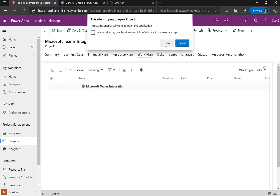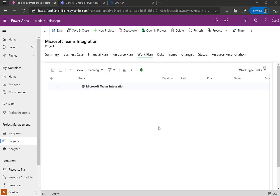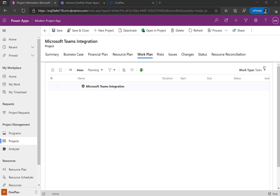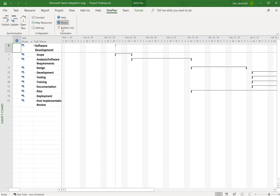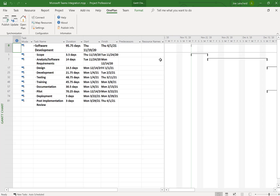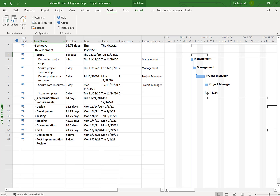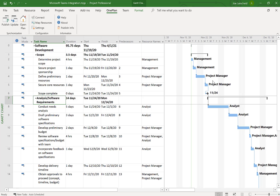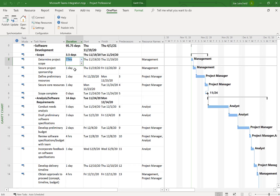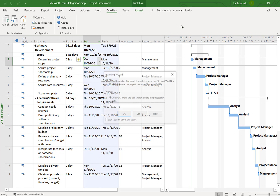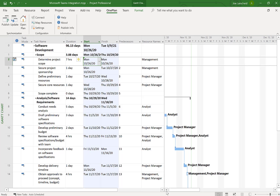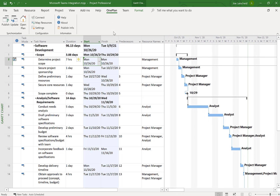Now it's asking me to open up Microsoft Project Desktop in the client. It's created a Microsoft Teams Integration project using the template, so I can quickly make some adjustments. You'll also notice we have some generic resources assigned to this. I can make adjustments and change things around. When I'm ready, I go to OnePlan in the ribbon and click Publish.